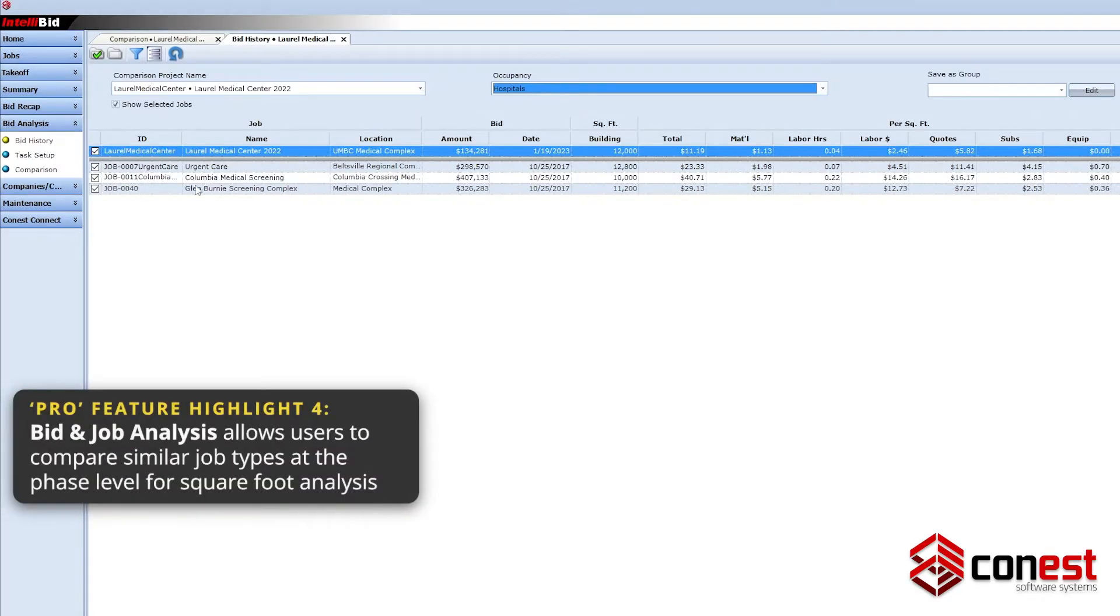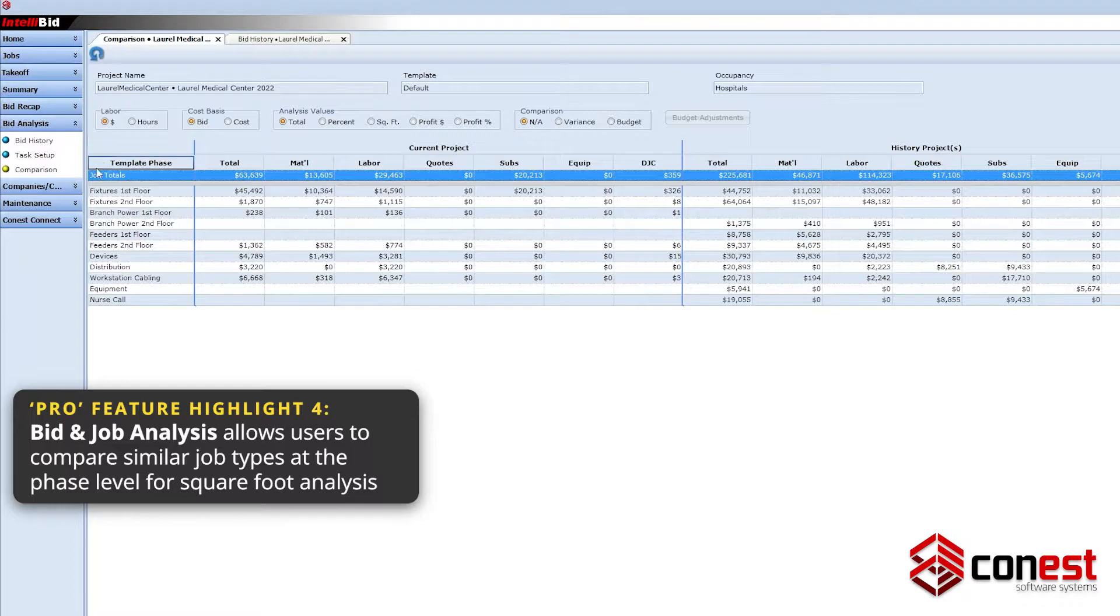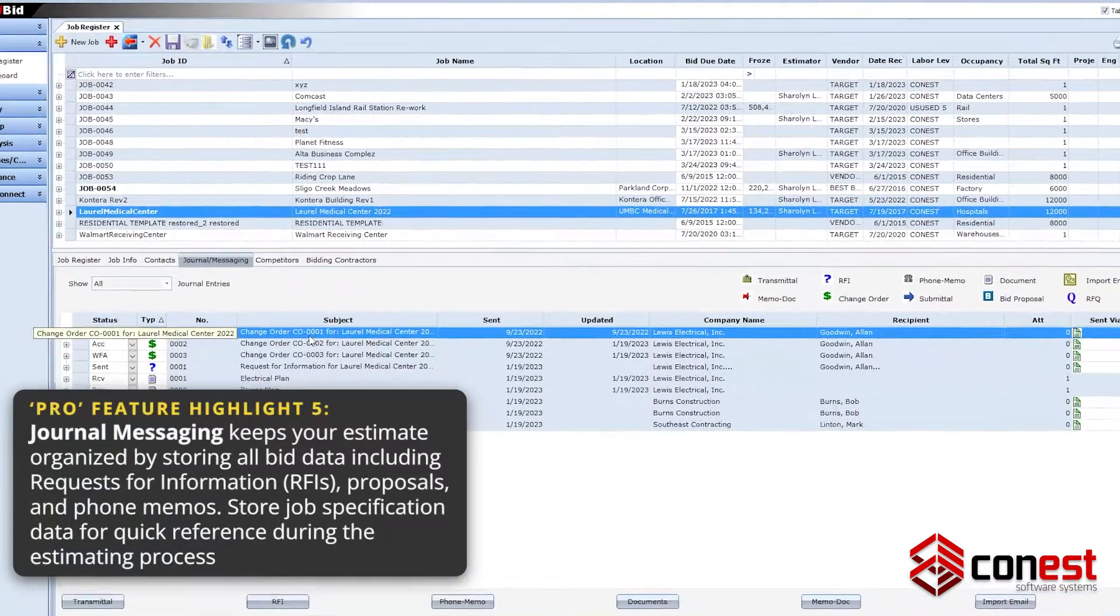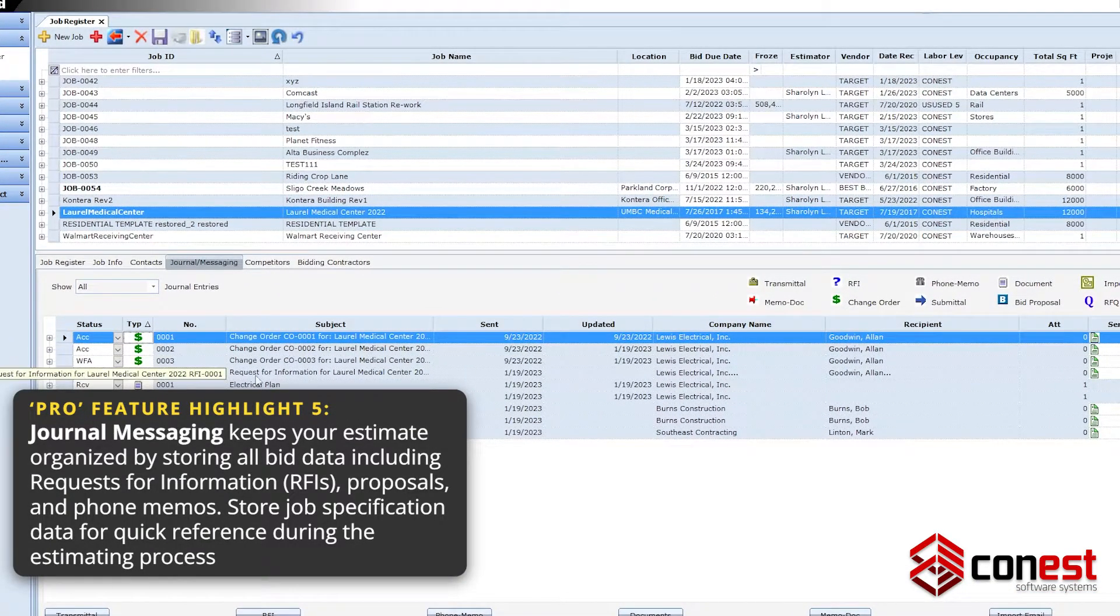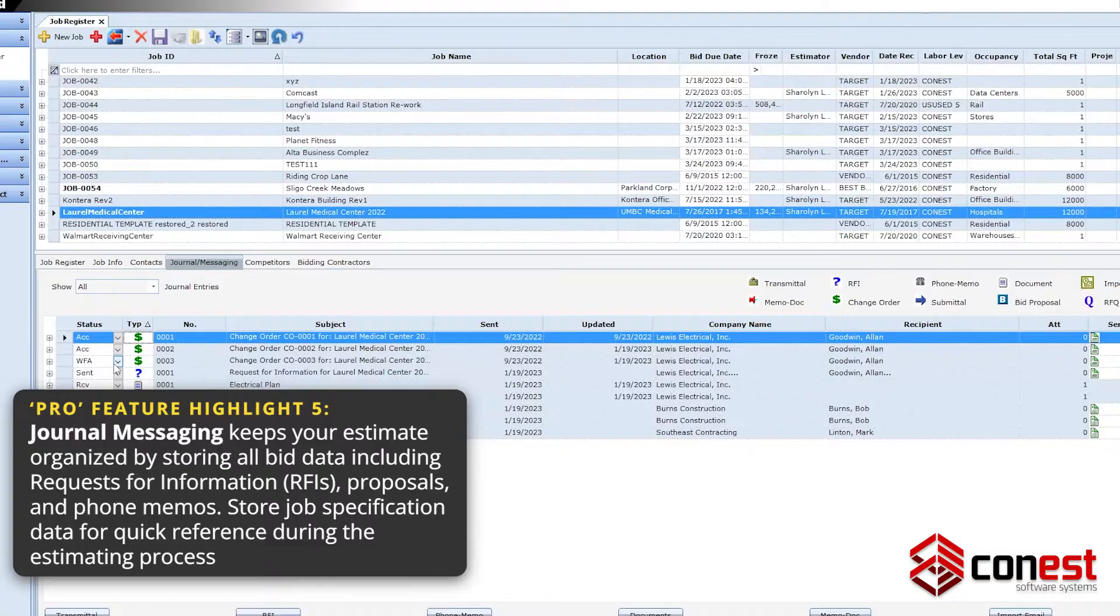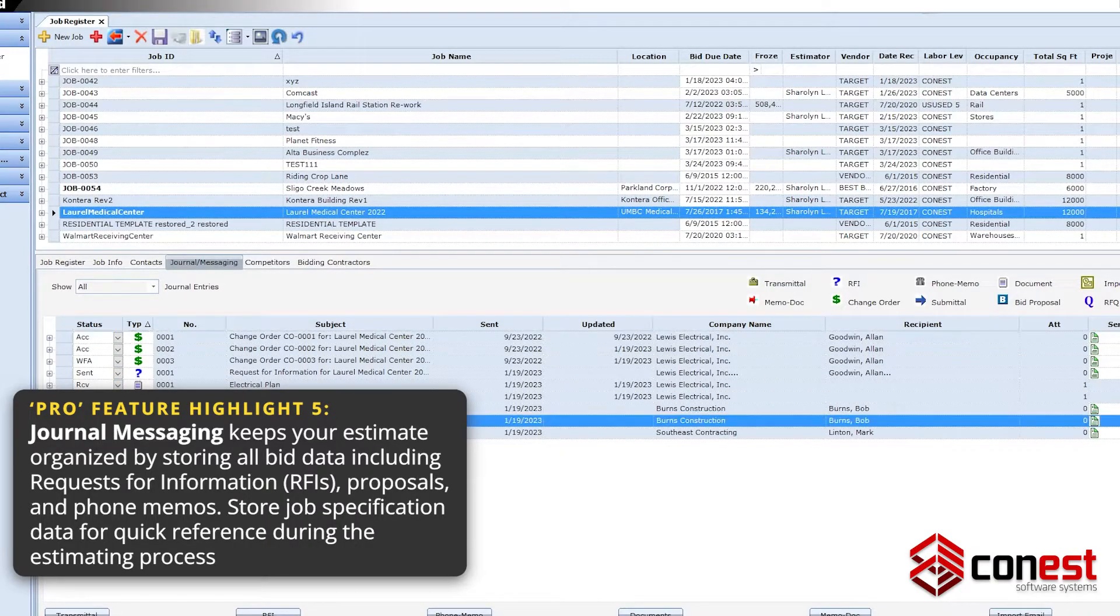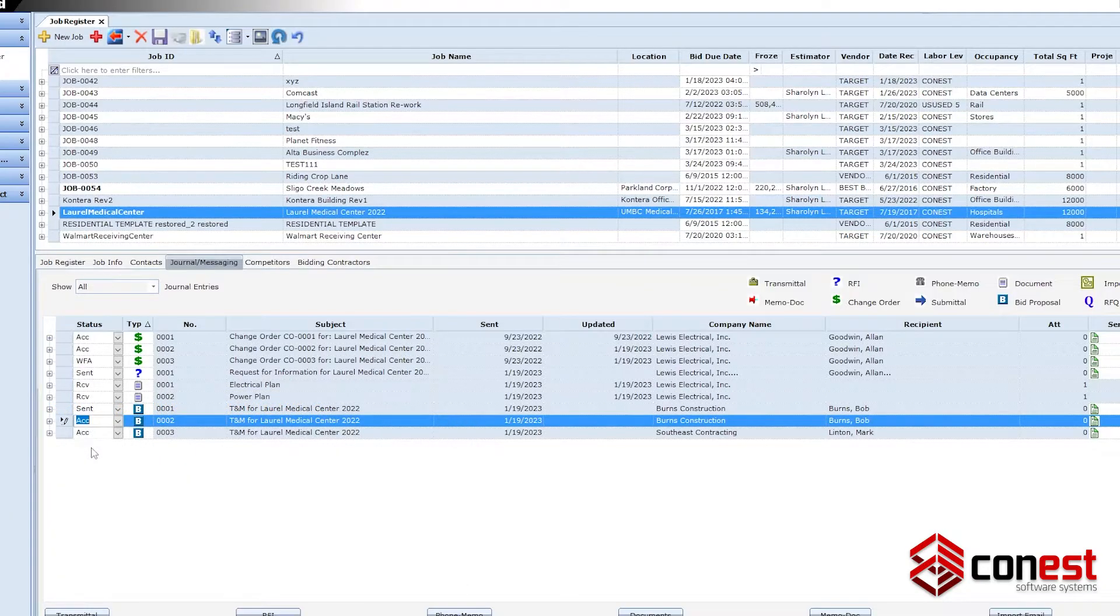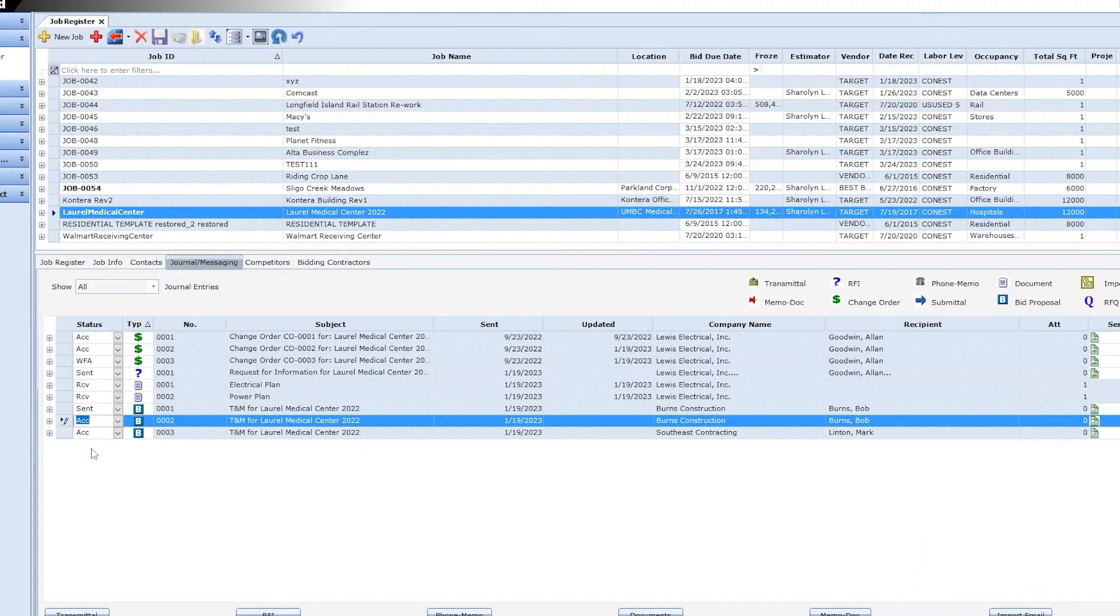Bid and Job Analysis helps users compare job types at a phase level for square foot analysis. Finally, Journal Messaging keeps your estimate organized by storing all bid data, including requests for information or RFIs, proposals, and phone memos. Users can also store job specification data for quick reference during the estimating process.